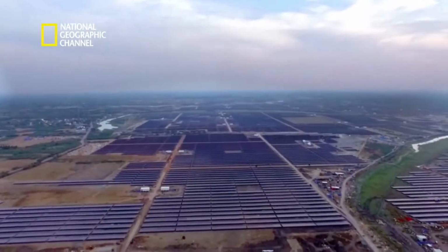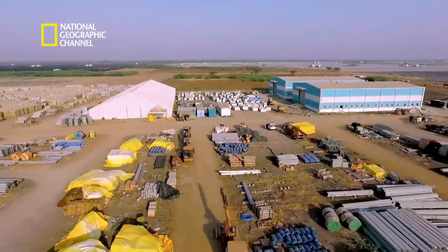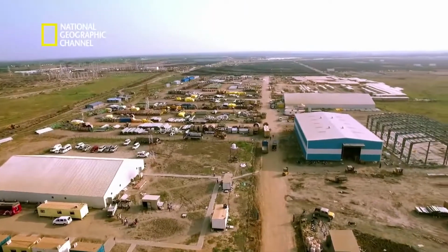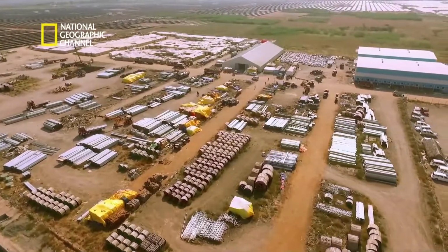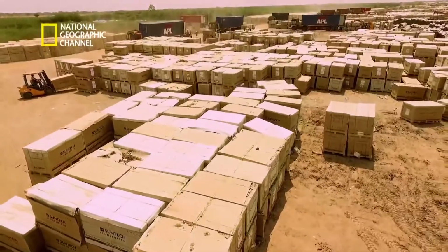Major task is, you may get to site, but how do you do unloading? And where do you store? No one in the world has attempted setting up a solar power plant of this magnitude. Critical components like inverters would need closed warehouses. When these weren't getting ready in time, the project management team had to make some quick decisions, like hiring go-downs at Kamuti till the warehouses on site got ready. That would happen only by mid-October, a delay of more than a month from the time the containers started arriving on site.